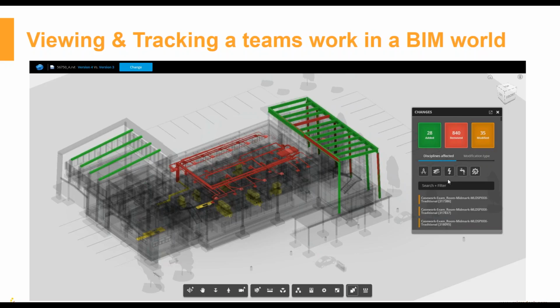The great thing about this is I can actually start to filter that information. I can cut that back or simplify it or even search within it to say, only show me these specific things that have changed. Only show it to me if the properties have changed or the physical location has moved. So we're seeing more tools that have a great ease of use. They're accessible from just about anywhere. And a PM can use these to do markups, track changes, and actually communicate with others both on their team as well as other teams.